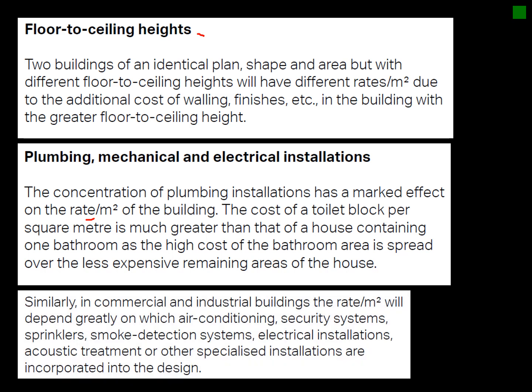Then similarly, with commercial and industrial developments, there's a big difference between developing a nuclear plant in comparison to a normal house that you're building. The cost, those are the two extremes almost. Industrial development might be cheaper if you've got big storerooms, but if you need to refrigerate those stores or put in air conditioning for that volume, it may raise the cost quite a bit. So those are the things that you need to look at.